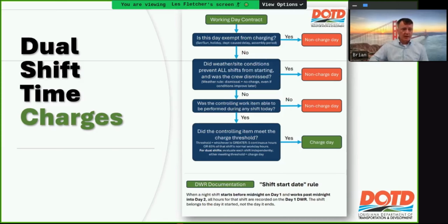The Christmas holiday periods, right? We'll tell you don't work in this period. Then we give you all that. We give you the benefit of the doubt. We give you that whole period back. We don't try to nitpick on, well, you didn't plan to work this day, even though we told you not to work for 7 days. So we use some common sense and some logic and try to be fair and consistent.